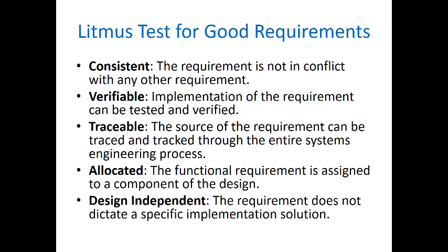For example, going back to the bike rental example, if you just say that I want the bike rental system to be available, what does that really mean? How are you going to measure availability of this system? But if you mention explicitly that I want every person to find a bike at the bike rental station 95% of the time when they get to the station, that shows the level of availability that you want the system to have. 95% availability, not 50% availability.